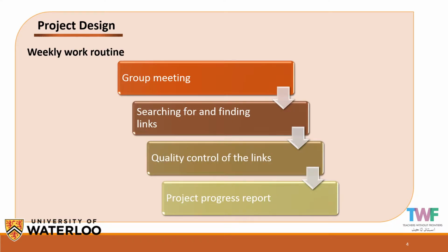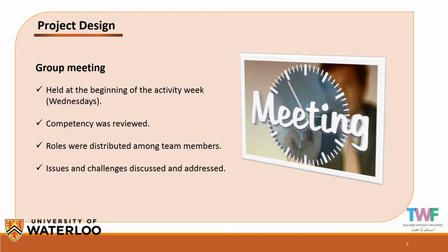Our project design had a simple weekly routine. We conducted weekly meetings followed by our search for resources. We also performed quality check and prepared a weekly report along with the resources which were submitted to our project sponsor. Every member was instructed to review the competency before attending the meeting. This enabled us to forecast any issues and challenges. During the meetings, the tasks and duties were delegated. An internal deadline was also set so as to keep us on track.